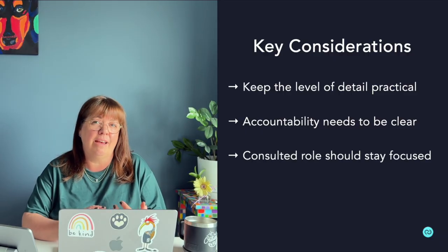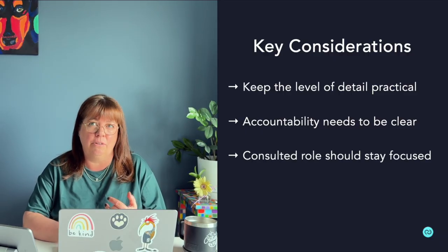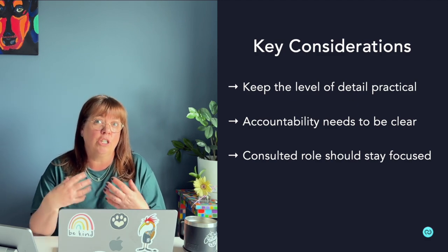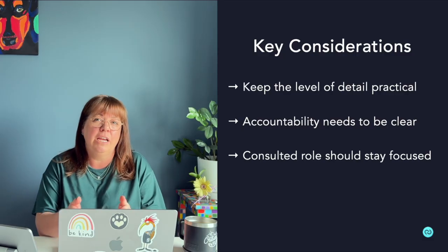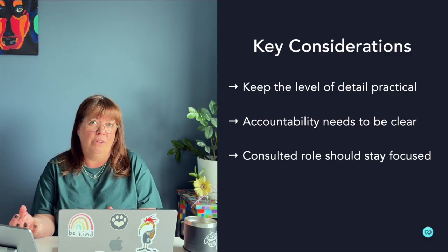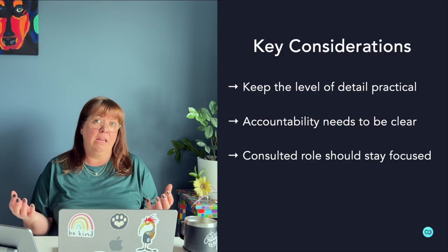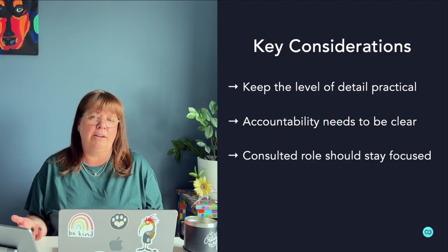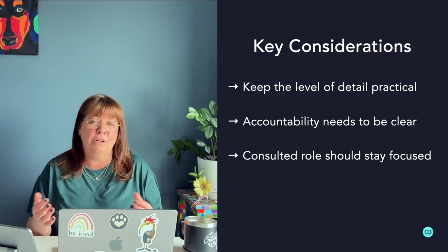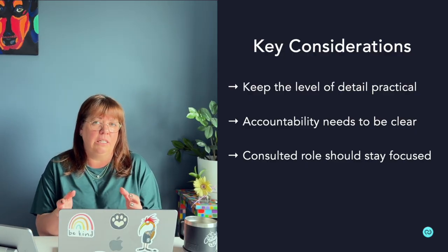And the third is having too many people in that consulting category. You want to be really deliberate with where you put those consultings, and it needs to be individuals who actually need to provide input in order for decisions or activities to be able to move forward. If you have C's beside everybody, then everybody is happy to provide an opinion, and you sometimes can get quite bogged down in trying to figure out whose opinions you're supposed to listen to. So clarity around those C's is a big one.